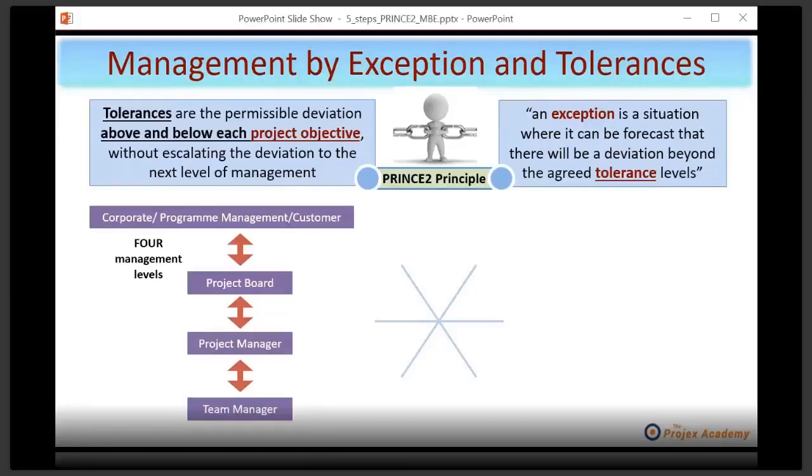It will be agreed how many management stages this project will include. So even though the project manager will be helping to design exactly how many of those exist, I'm afraid the project manager only gets the project released to him or her one stage at a time. So when starting to sign off the next stage plan, the project board will set stage level tolerance. Coming down to the project manager, therefore, the project manager must deliver that stage within the tolerance bounds.